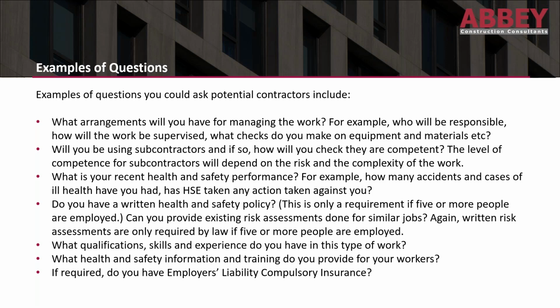You have to have that kind of background, that in-depth look at what their practices and procedures are. What qualifications, skills and experience do they have in this type of work? And remember, there are 2 types here. The first one would be an organisation level, where you would look for CHAS or SafeContractor accreditation, SSIP, etc., safety schemes in procurement.